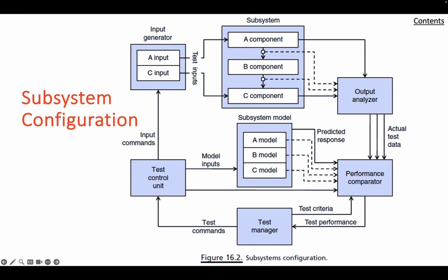As in the case of subsystem integration test facilities, the system integration facility must provide for extracting data from test points at internal boundaries between subsystems as well as from the normal system outputs. It should also be designed to be flexible enough to accommodate system updates. Thus, the design of the integration facilities needed to achieve the necessary test conditions, measurements, and data analysis capabilities is itself a major systems engineering task.